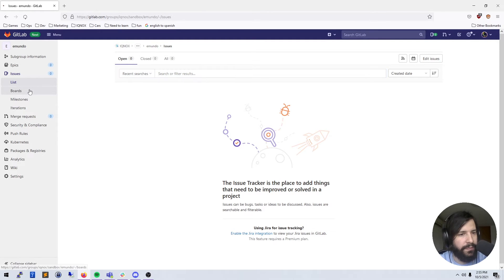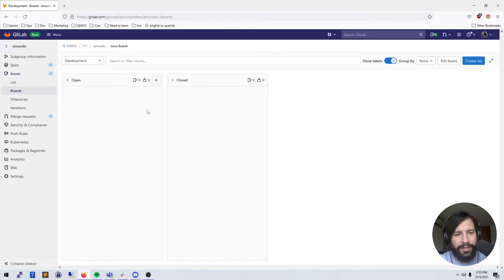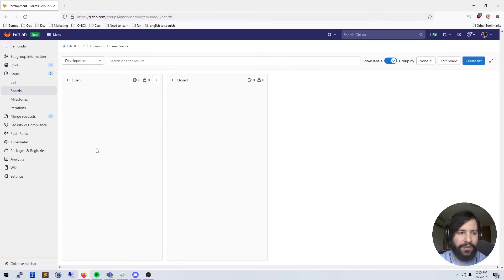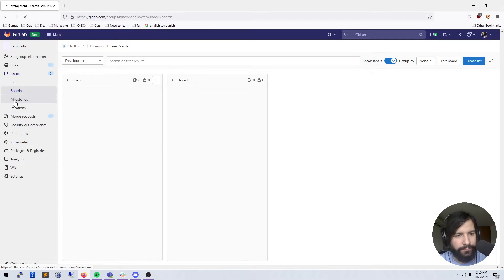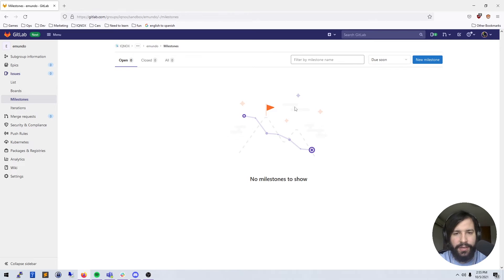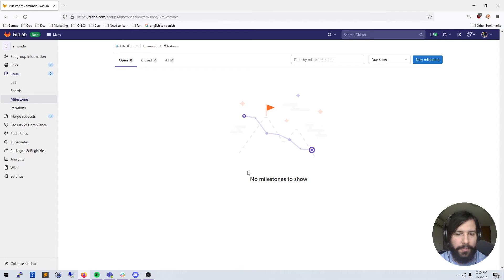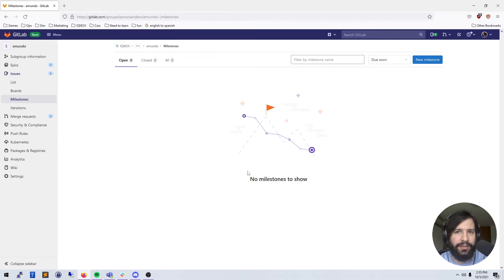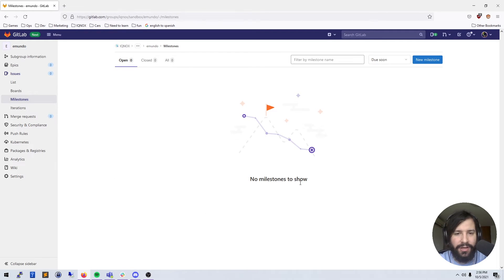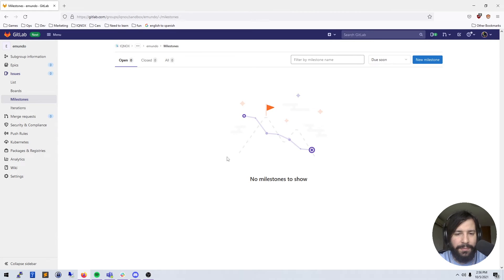Then we move on to milestones. Milestones are just sprints like I said. You can take your issues and put them all into one milestone, and that way you can track how much work is being done inside of a milestone. You can have multiple people working inside of a milestone and then issue out work to each individual person throughout the week. And then as that work gets done, people can move them into the closed status.